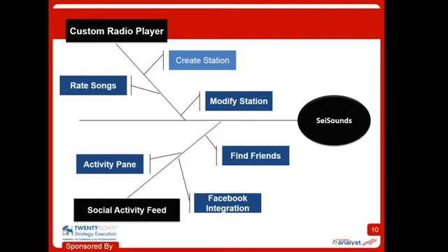So, knowing that his goal is to increase listening time so that he can increase subscription revenue, Blue's going to decide the obvious thing here, which is to build out that custom radio player first, in the first release, okay? It's not to say that the other things, like rating songs or modifying stations, those again in the L2s there, aren't nice features, right? It's not to say he shouldn't do them, but the key is that Blue's going to invest the minimum possible time to determine how he can start to move the dial on subscription revenue, right?